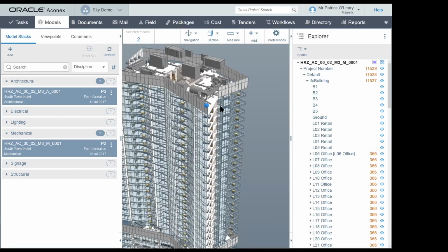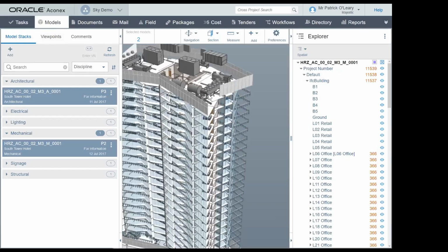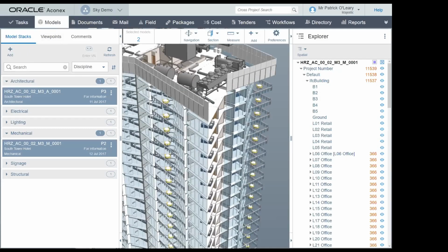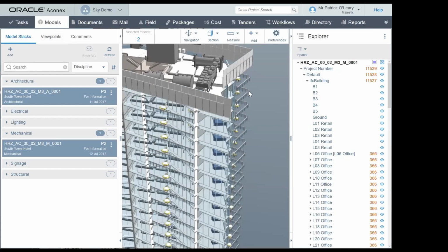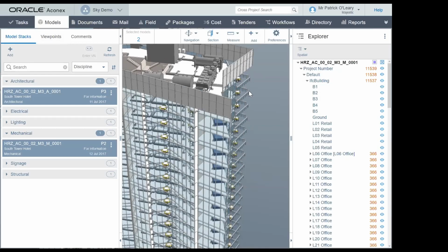It also helps you to do clash management, so not clash detection, but clash management. Let's say you've run your clash detection in Navisworks somewhere, but you only have 5 people that can access Navisworks because that is a design team. But you actually want the extended project team, extended design team to be able to integrate and interact with the model. So you bring all the information from the different architect firms, different engineering firms together